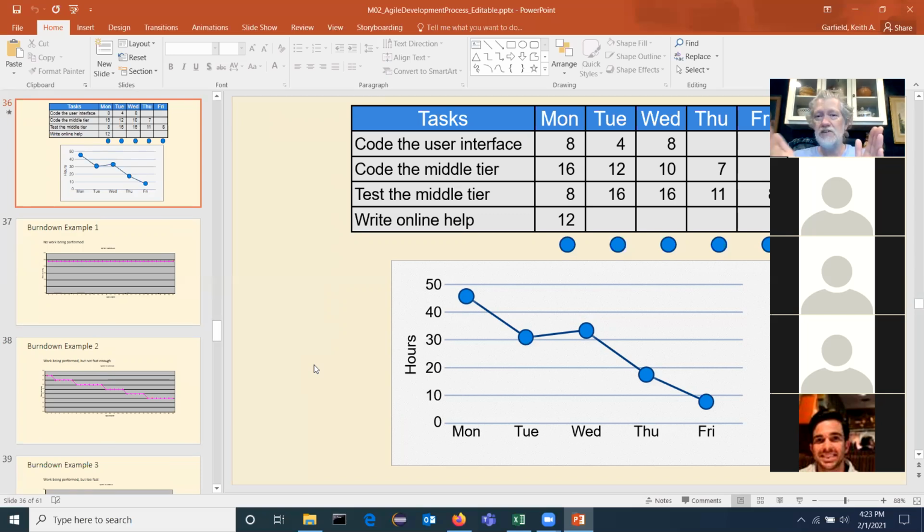And also at the end of the semester, we're done, right? You might have stuff in your product backlog still, but as long as we agree on what minimally viable product looks like, then those things that are in your backlog that are not completed are fine. And again, it stops this whole thing where software that should have taken a year took 2 years. Instead, it took a year and we got 90% of our functionality instead of 100% of our functionality. Because we all know the old saying, the first 90% of the work takes the first 90% of the time, and the last 10% of the work takes the other 90% of the time.